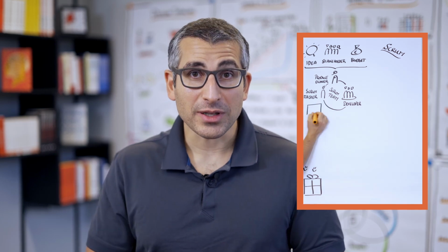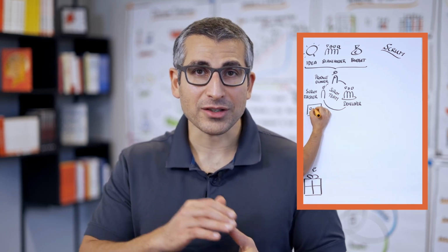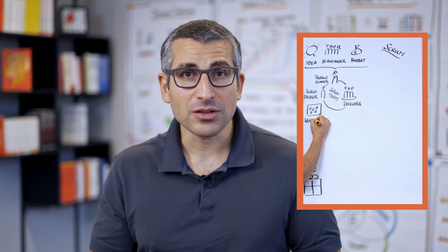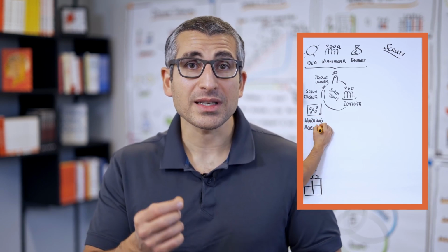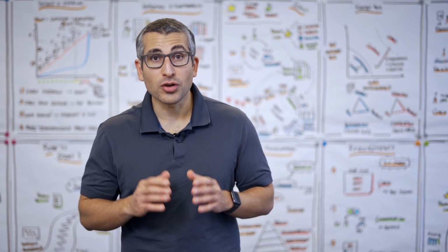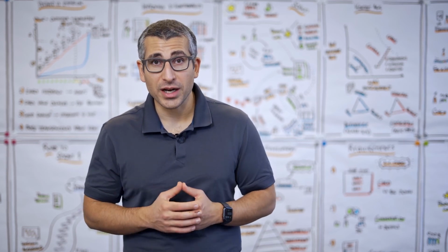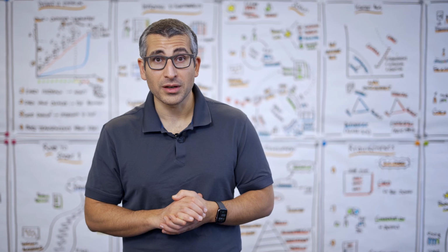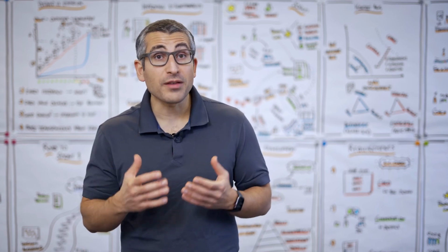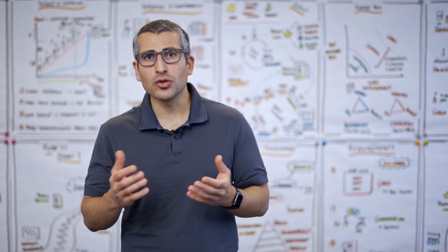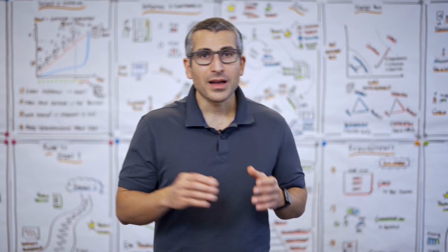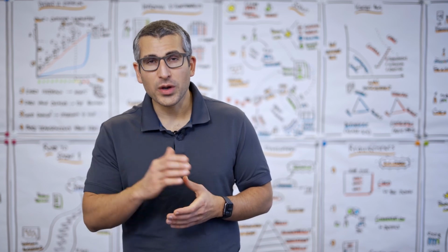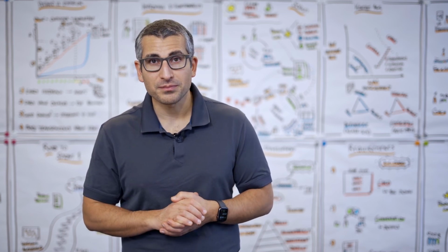Let's start with the working agreements. I usually draw them right next to our Scrum Master, because our Scrum Master is responsible that those working agreements exist. Any good Scrum Master knows that if a team doesn't have a shared understanding on how they're going to work together, when events are going to happen, what they value as a team, that team is doomed to fail. So a Scrum Master creates some kind of a workshop where the group of people collaboratively decide what they want their working agreements to be. They can use various templates for that, and we included one in your documentation.